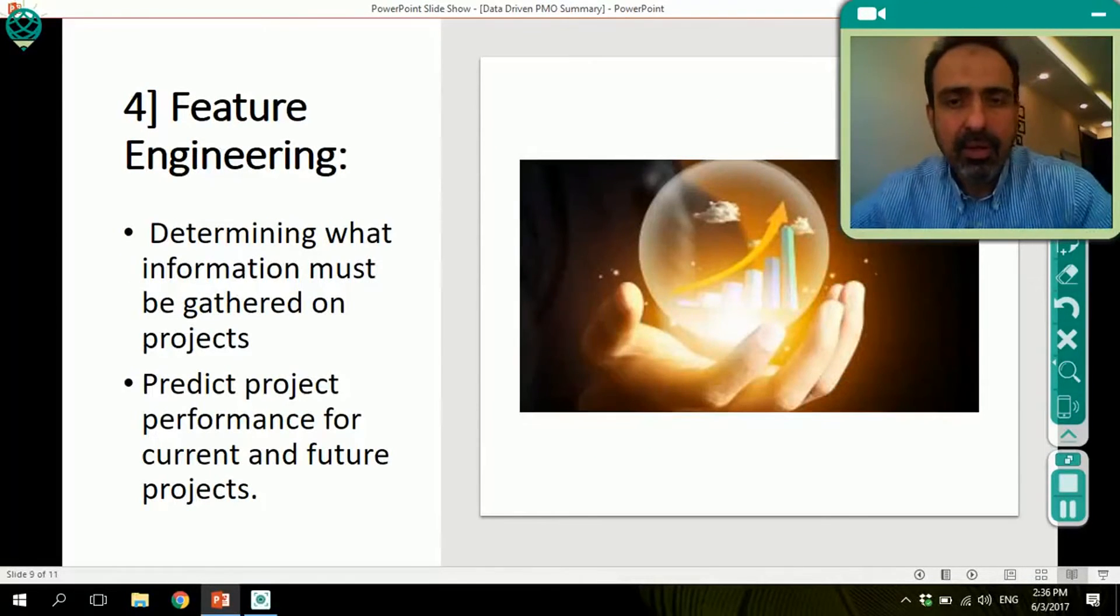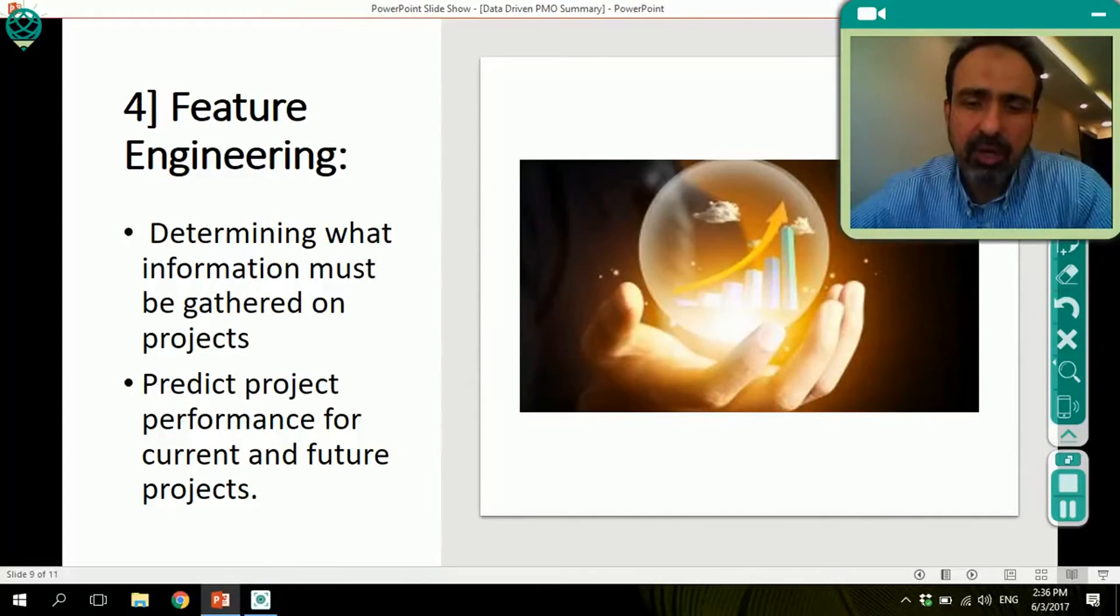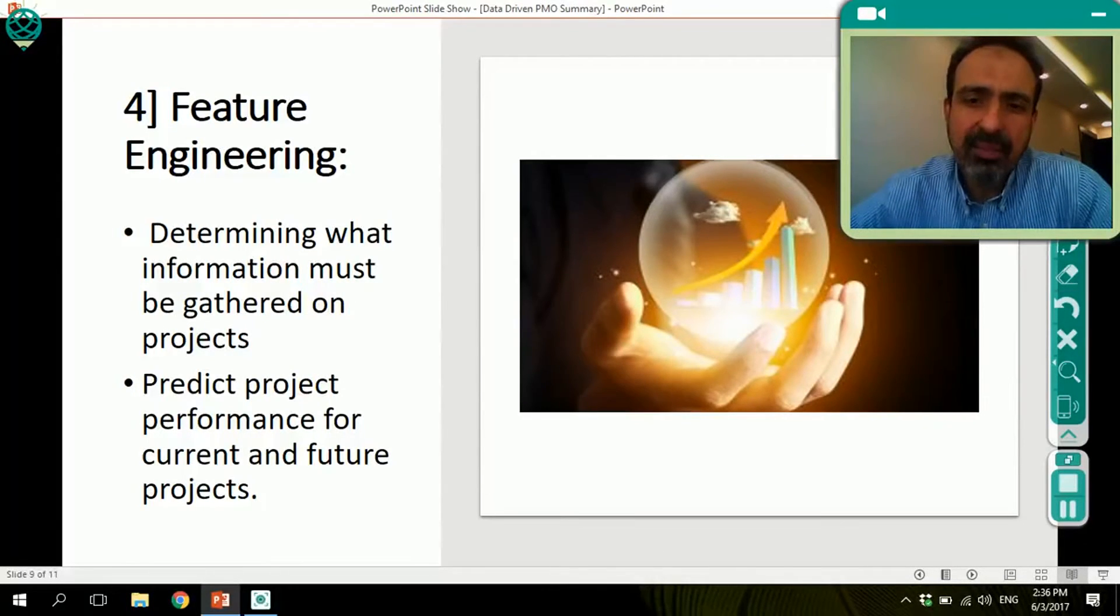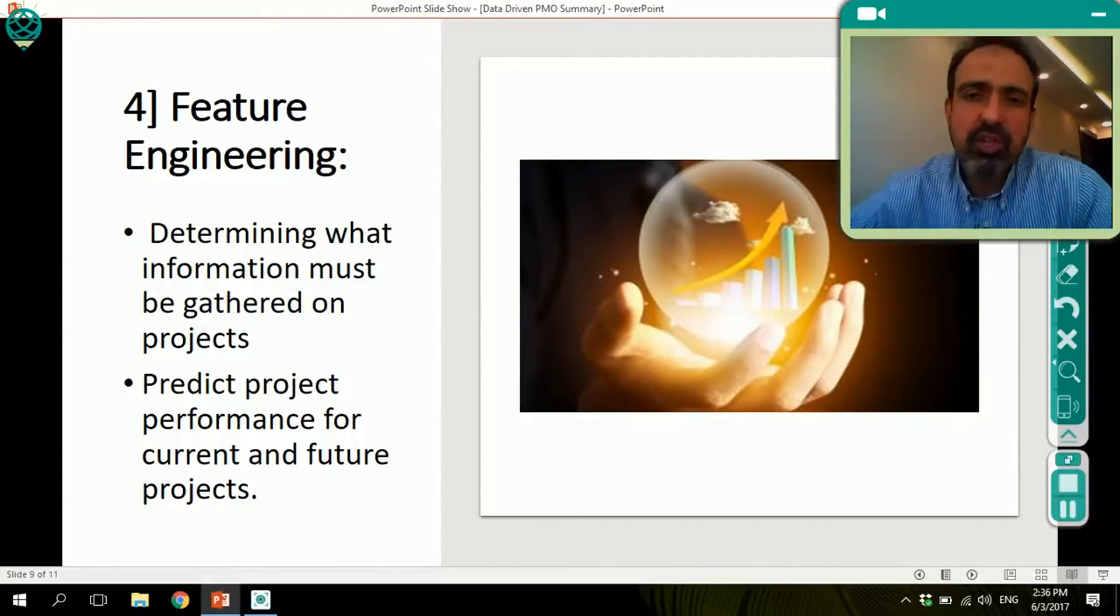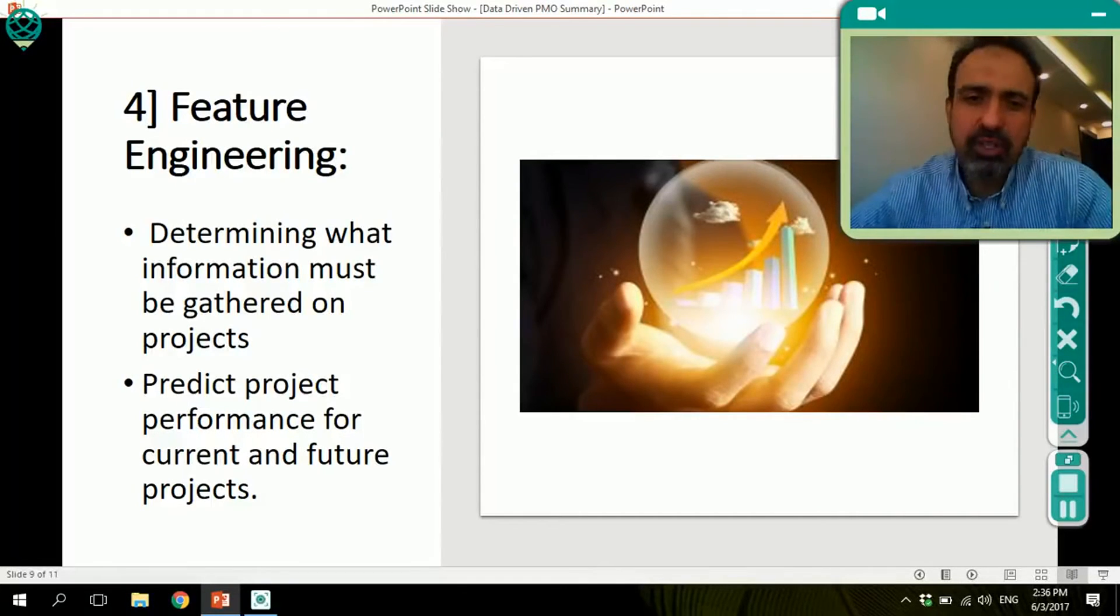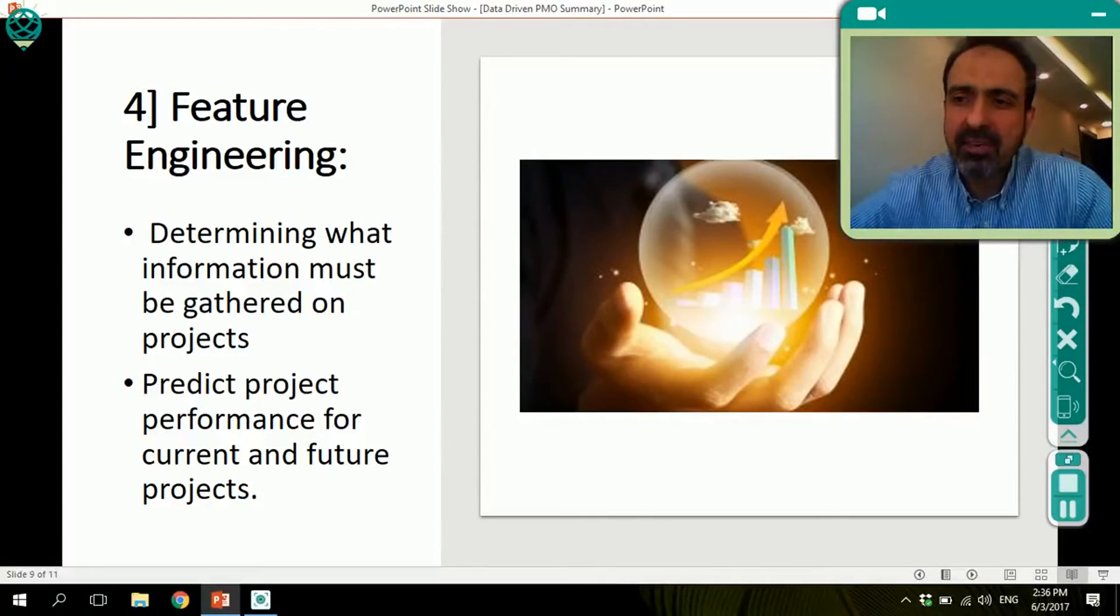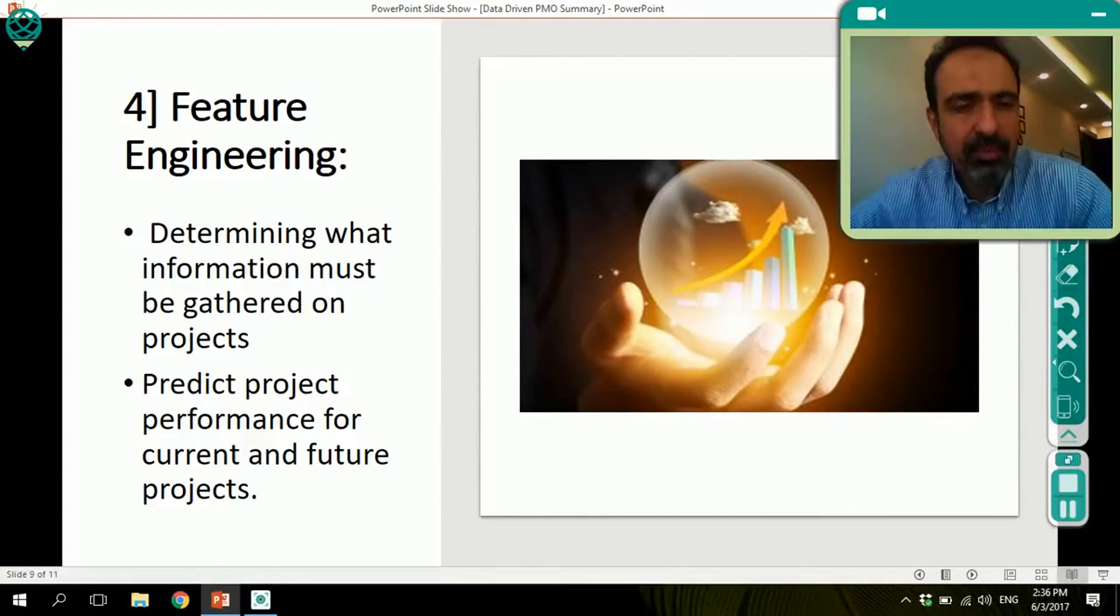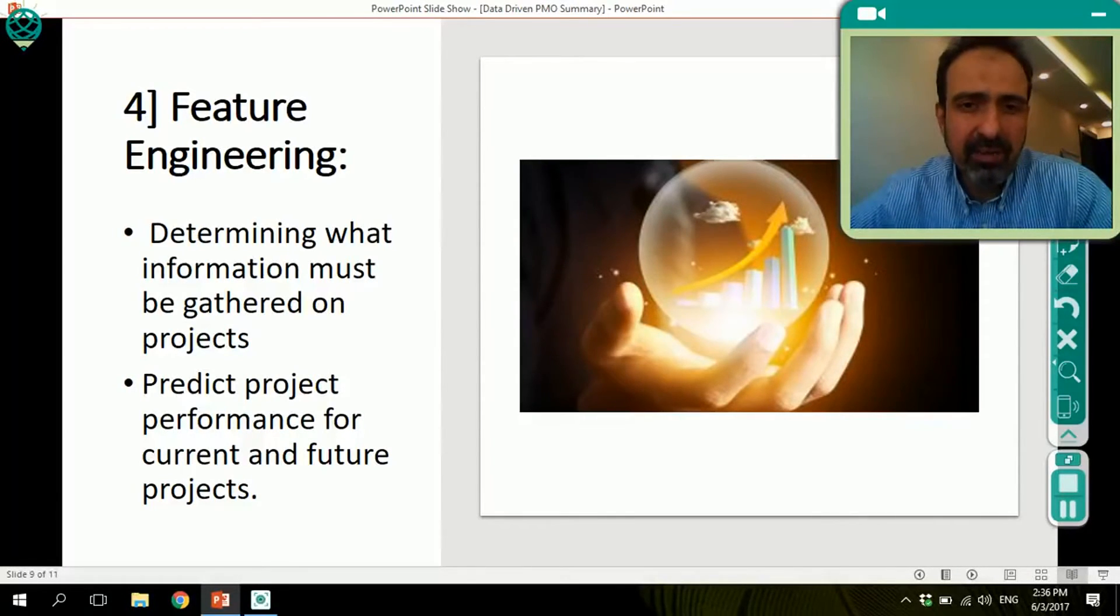The fourth point is feature engineering. Once we determine what information must be gathered on projects, we can actually predict better performance. Feature engineering means that we look at previous data, and from it, we learn about which fields or which types of data help us predict the performance of the project, or which types of data are relevant. This, many call, even though it's not a scientific term, but it's becoming more and more acceptable out there, is called feature engineering.